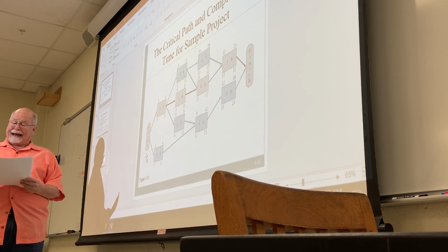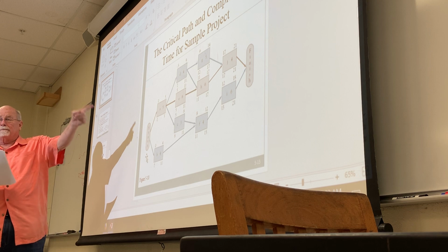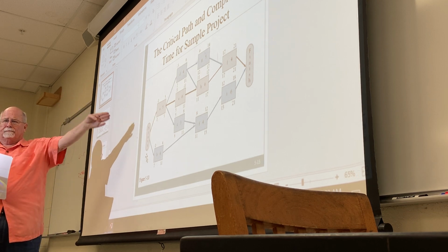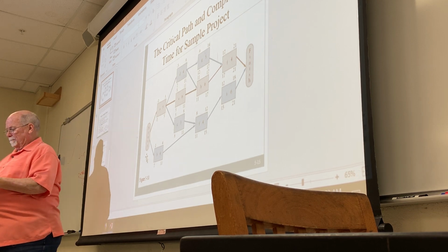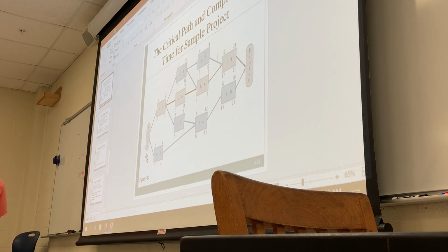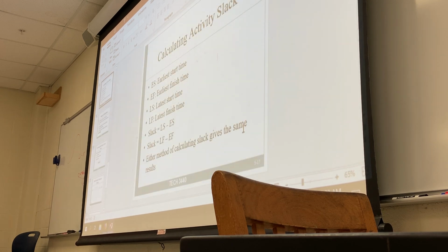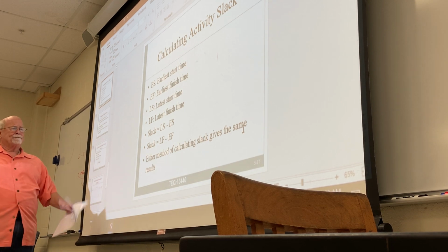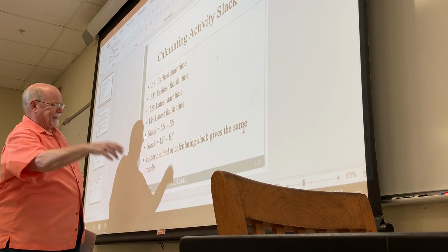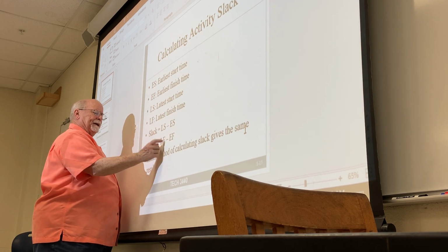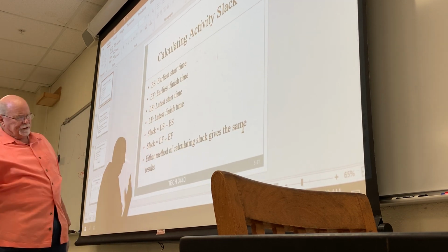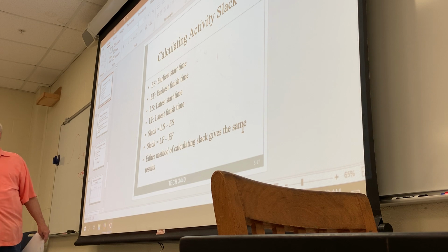I do ask for task slack, so you have to be able to do early start, that calculation, that formula. Slack for a task, it says activity, that's a task. LS minus ES, LF minus EF. You did that homework assignment already.